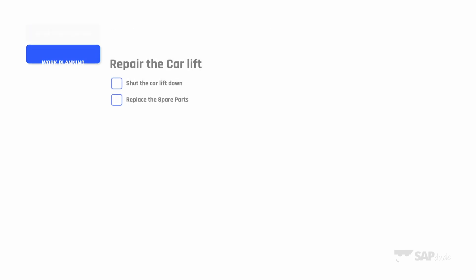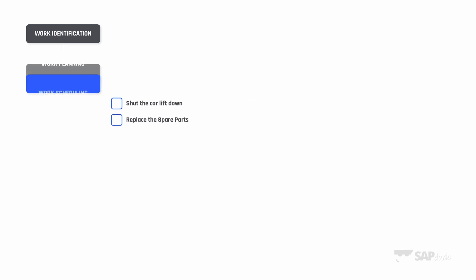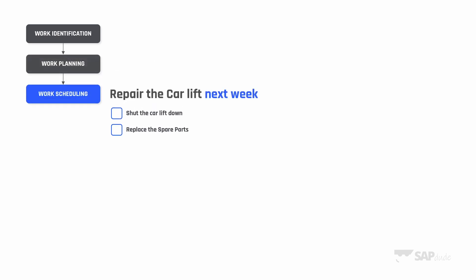In this example, one of our car lifts got damaged. It was reported by our workers and we have to perform maintenance work. Now we switch to planning where the maintenance planner does the work. He or she plans the list of activities which have to be performed to bring the broken car lift back to proper condition. Two tasks have been defined: shut the car lift down and replace spare parts.